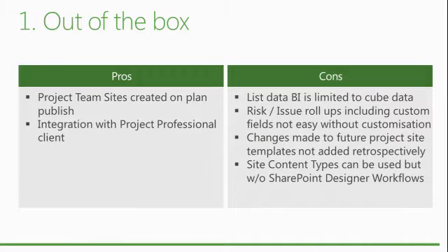If you want to roll up your risks across the board, because really they're developing a product for a customer, you can't do it in this out-of-the-box scenario very easily. The customizations they provide are not using the standard features of site content types, so you can't roll it up using the standard BI tools that you get in SharePoint. So you've effectively got siloed sites. What do you do about that? And then, to make matters worse, they put some restrictions on PWA as well.